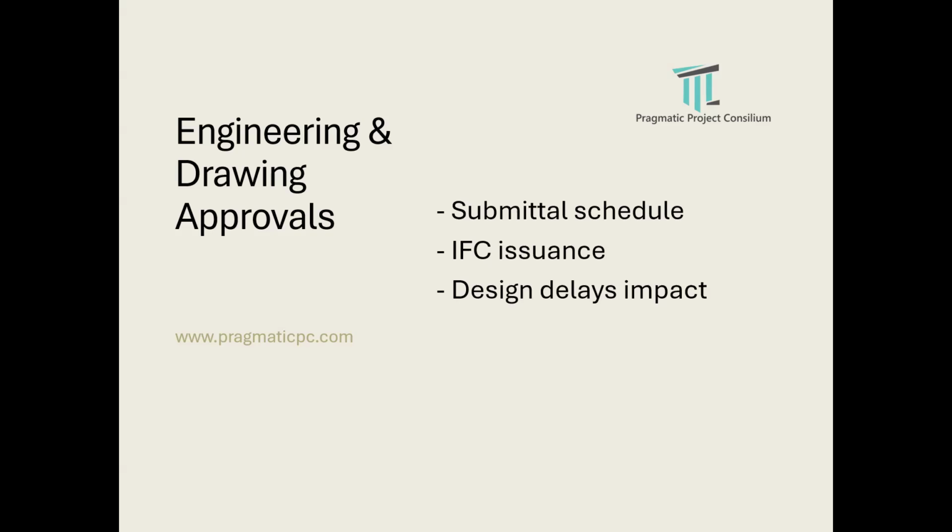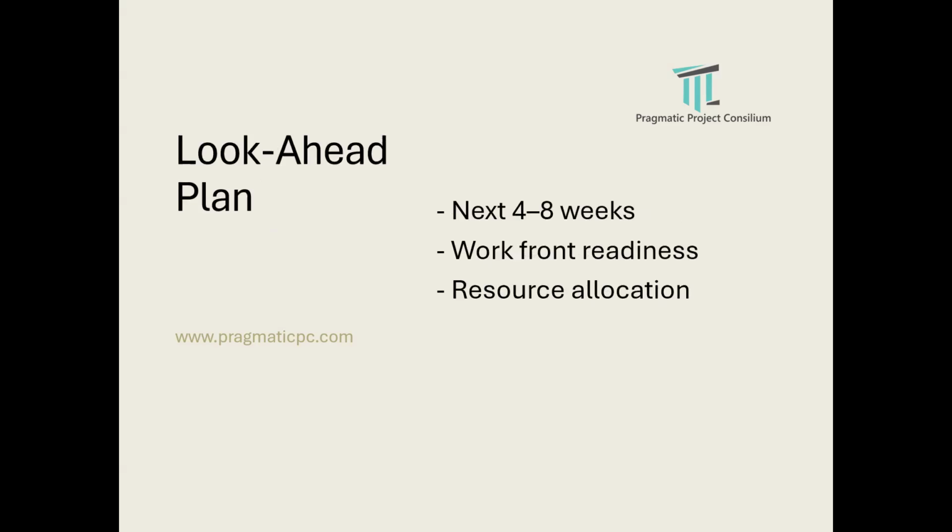And a welding procedure is the most important document, because without that, your walls or the major materials can't start welding. So the engineering has to sit with the procurement, the engineering has to sit with construction, and the project control has to mediate between them and make a priority set of documents in engineering and drawings, so that you can monitor the priority documents very easily instead of getting lost in the huge number of documents.